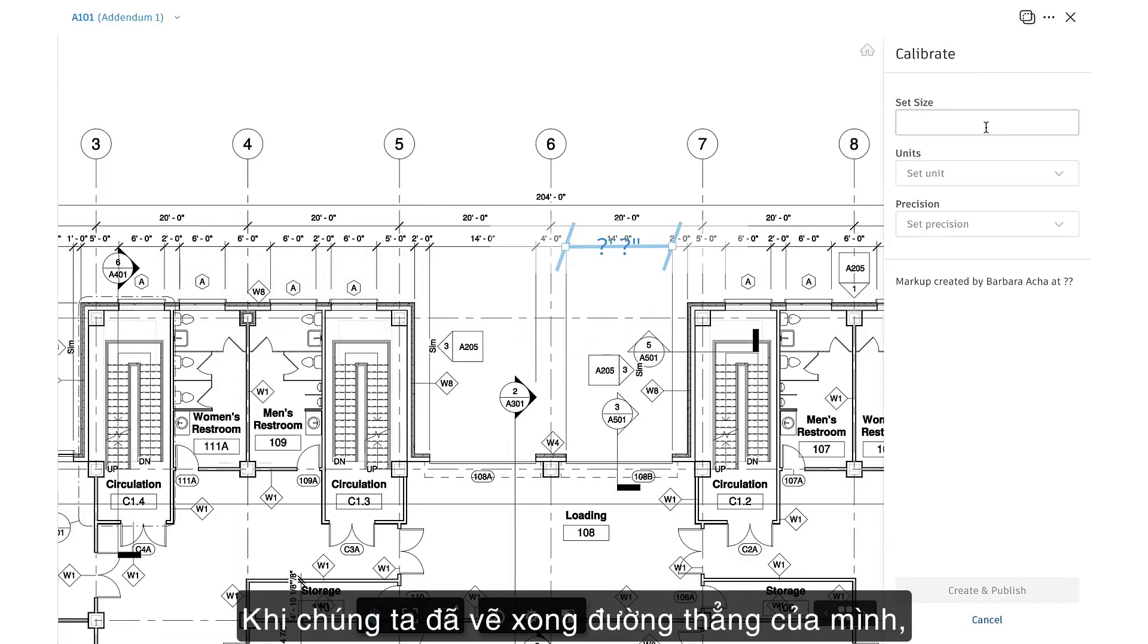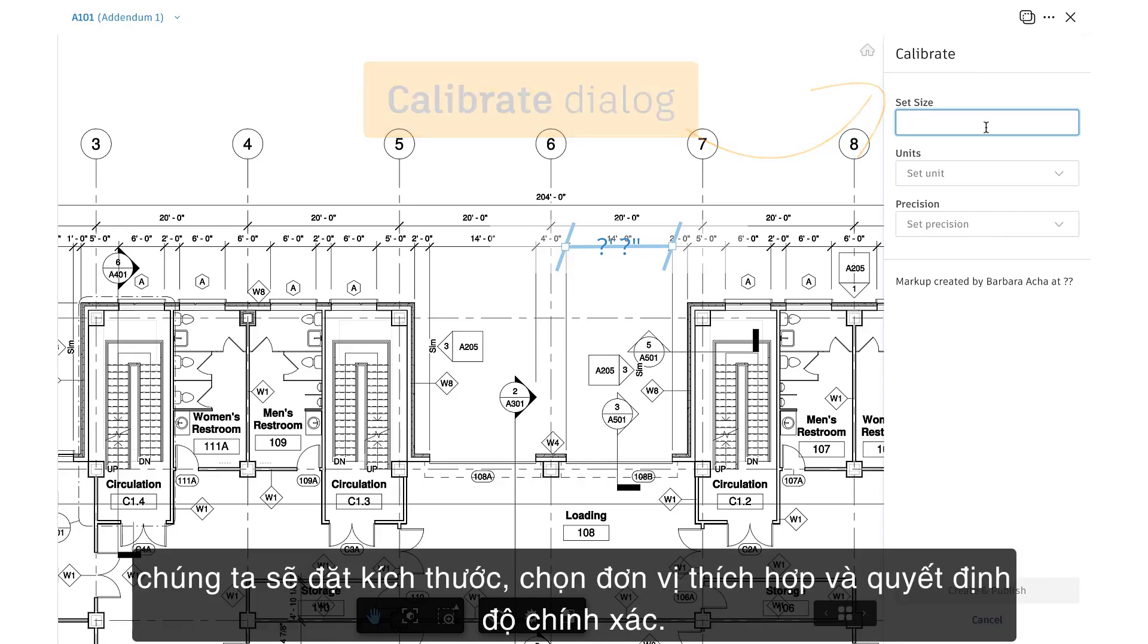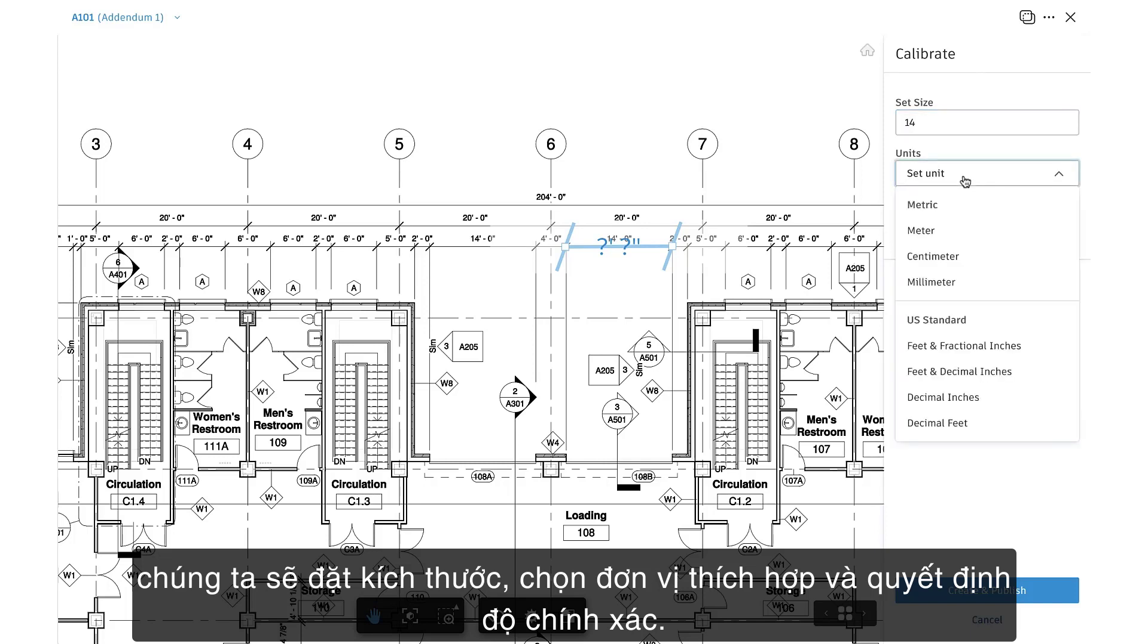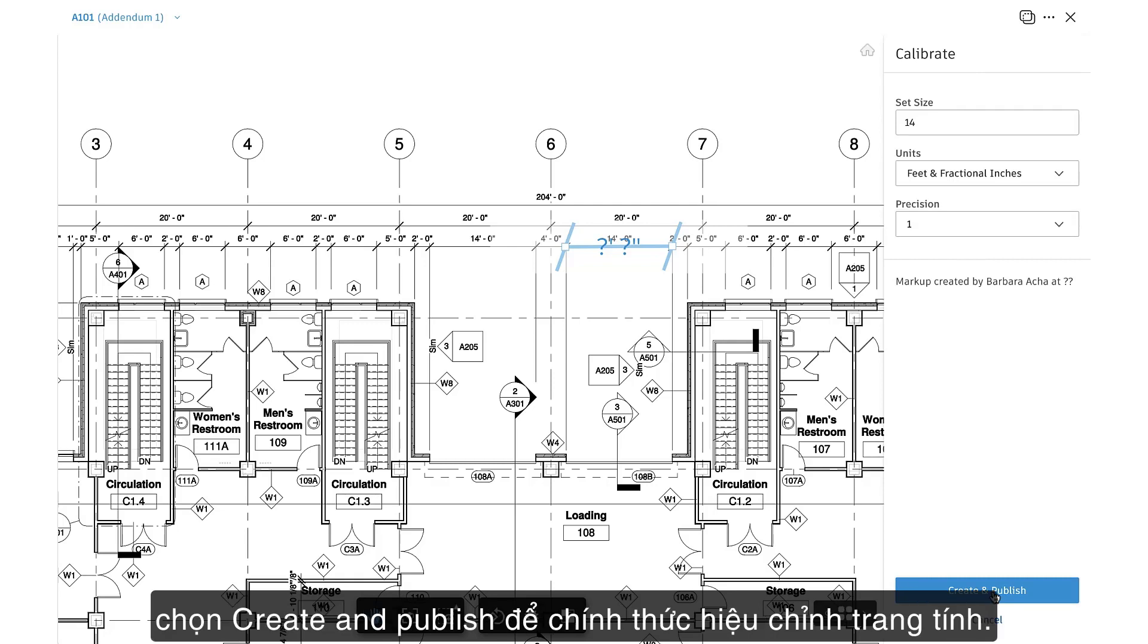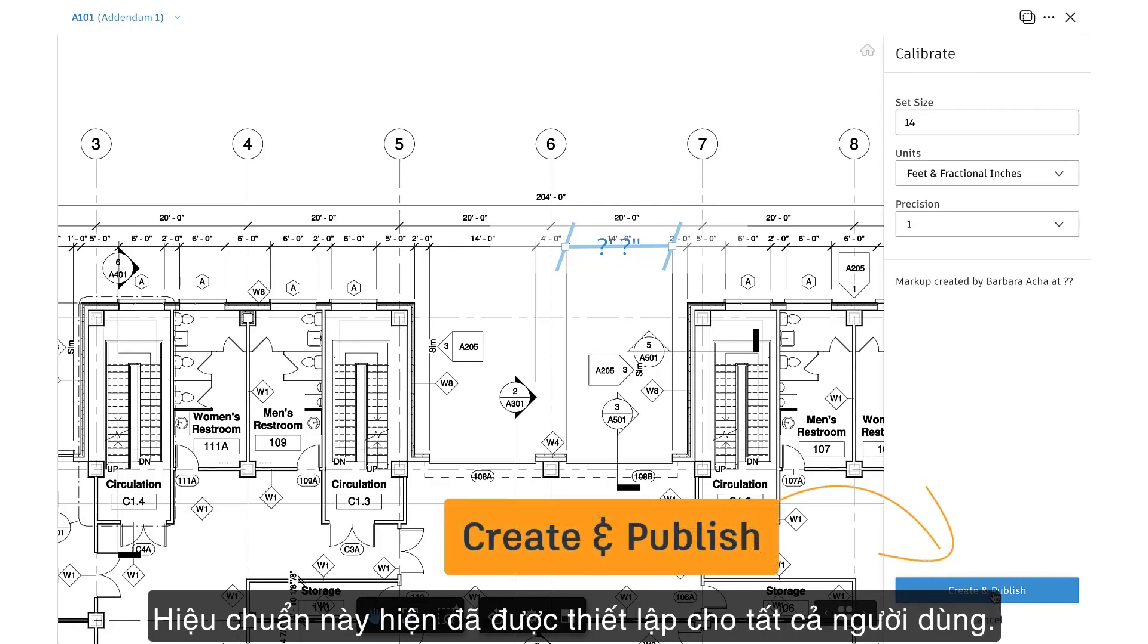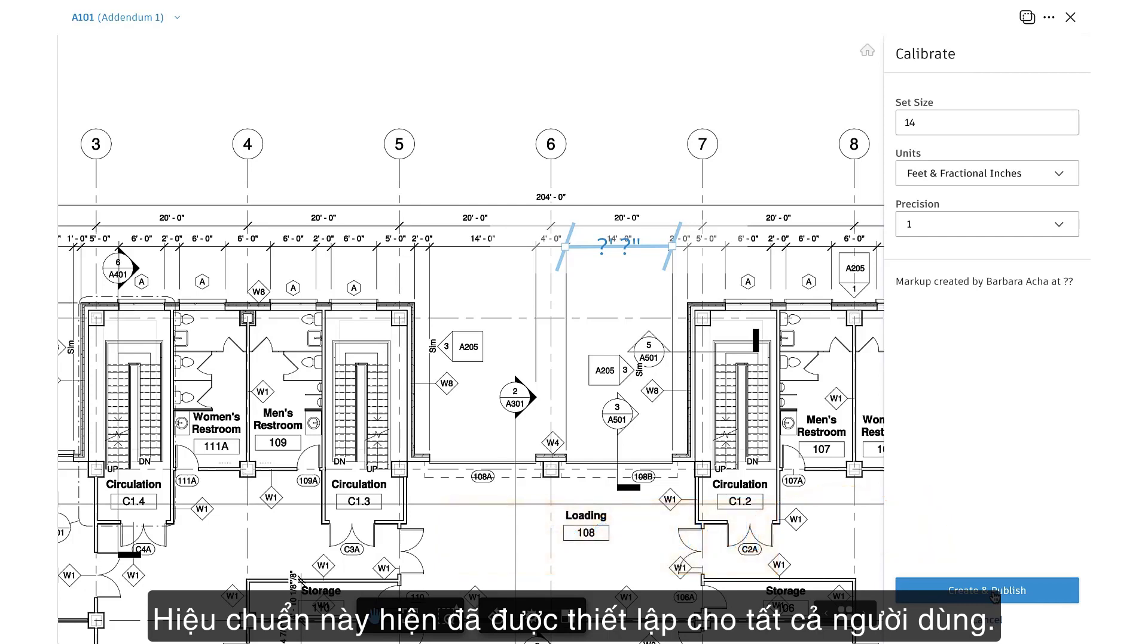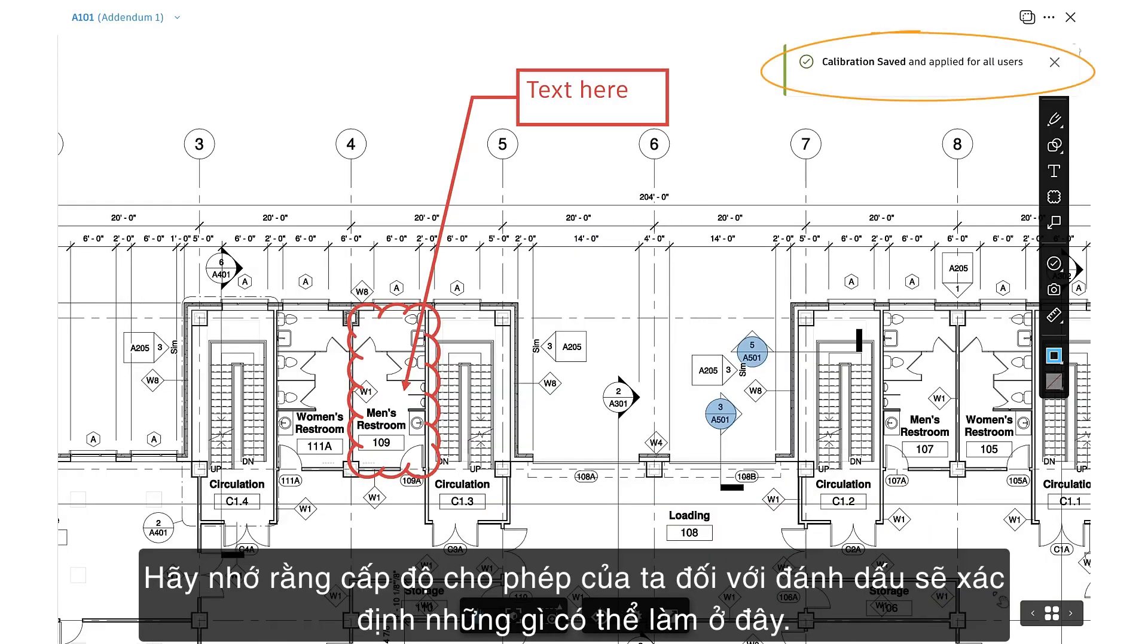Once we've drawn out our line, the calibrate dialog appears here. We'll set size, select the appropriate units, and decide on precision. Once we've input all required fields, we'll select create and publish to officially calibrate the sheet. This calibration is now set for all users.